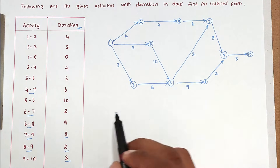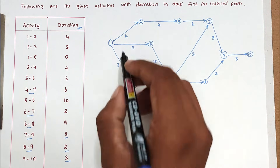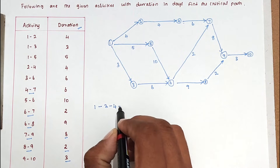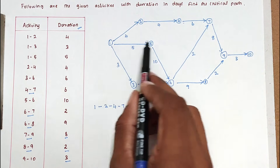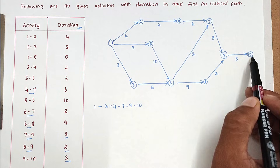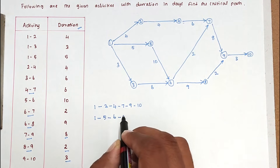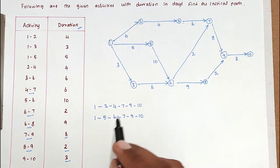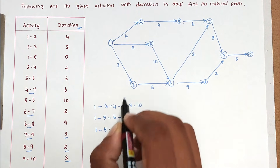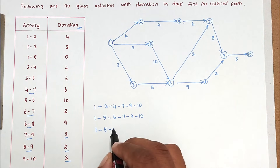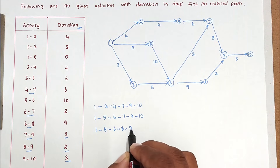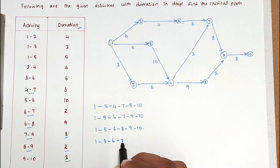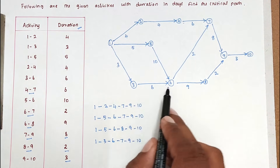Now we can find the different paths through the network. Path 1: 1-2-4-7-9-10. Path 2: 1-5-6-7-9-10. Path 3: 1-3-6-7-9-10. Path 4: 1-5-6-8-9-10. Path 5: 1-3-6-8-9-10. There are five paths in total.